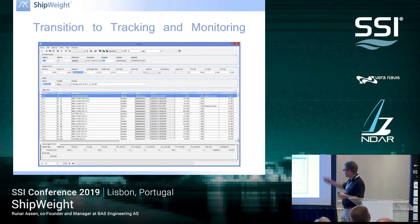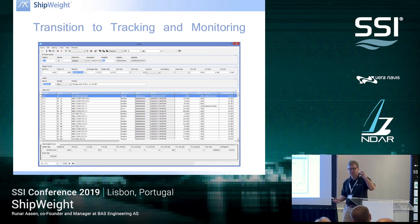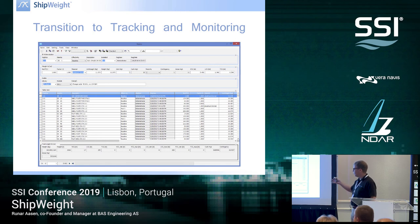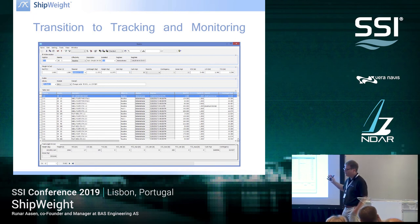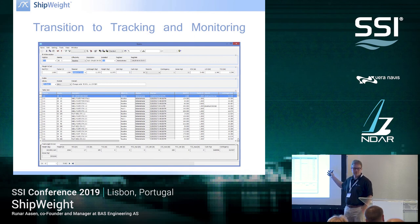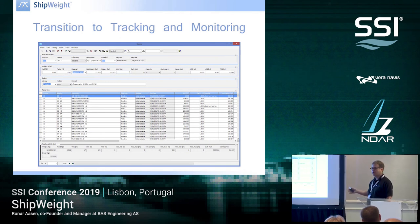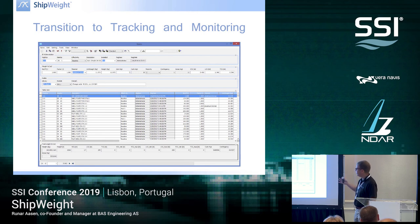It's very easy to start using the summary of your item list too soon before it's complete. But in ShipWeight you can monitor the difference, and then you switch to using your item list when you feel it is more accurate. This is all very flexible — you can change columns. It's a database tool but extremely flexible, just as in Excel you can add another column, you can also add another column in ShipWeight.